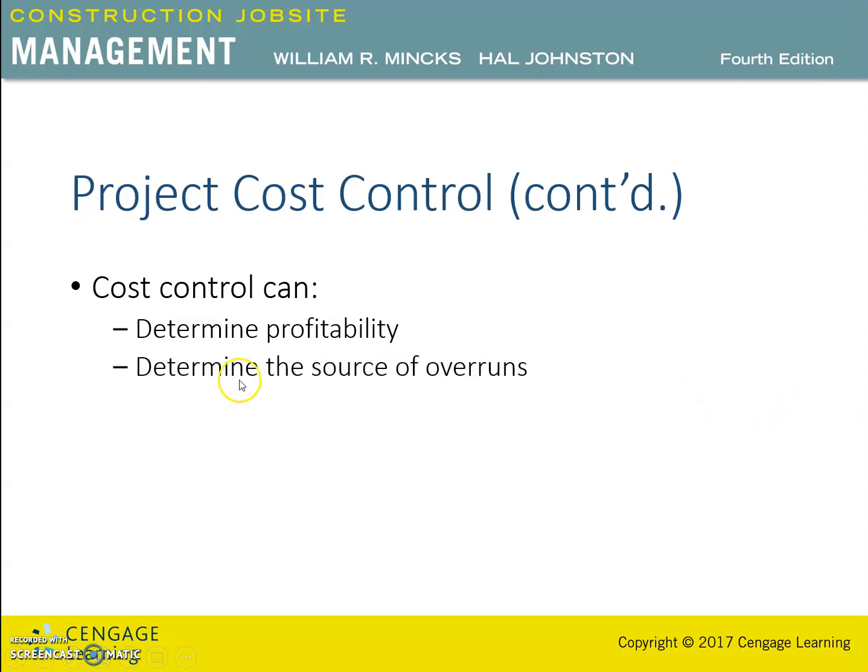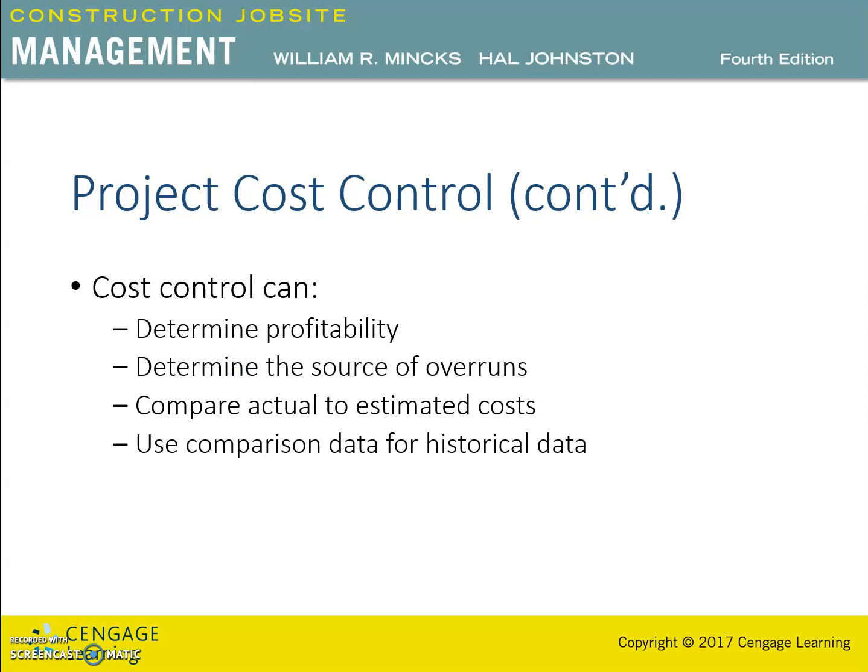It can also be used to determine the source of overruns to allow immediate steps or measures on future projects. It can compare work activity actual cost to the estimated cost for that activity. Analysis of this information can do the following. Determine crew productivity levels, identify